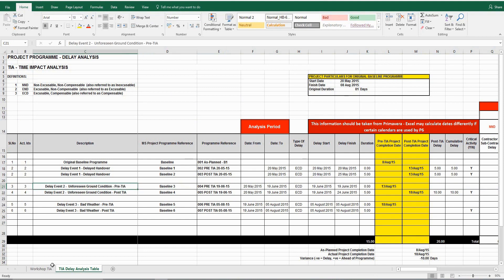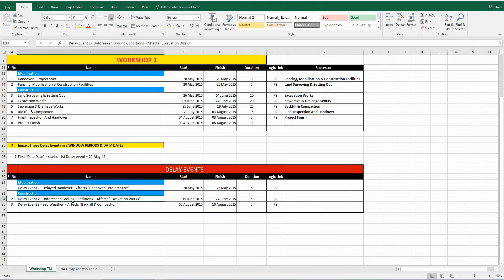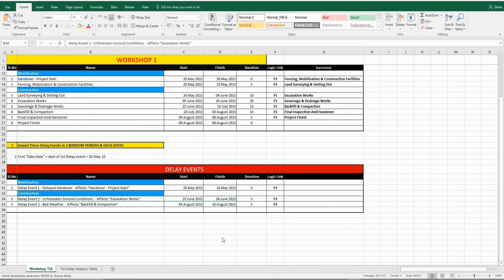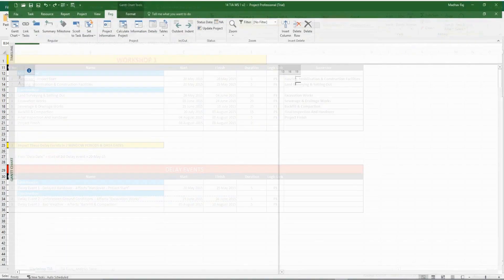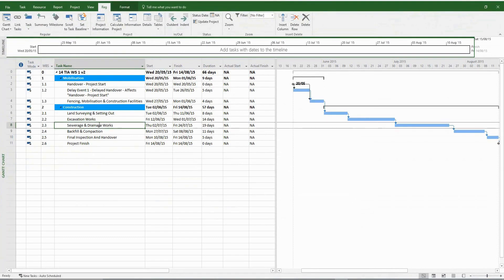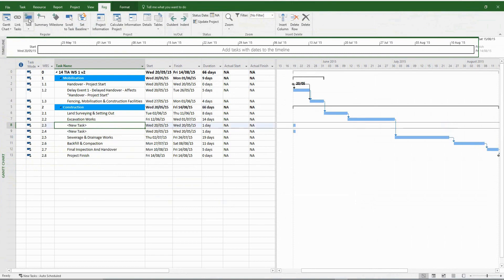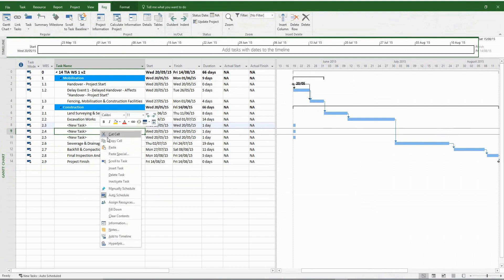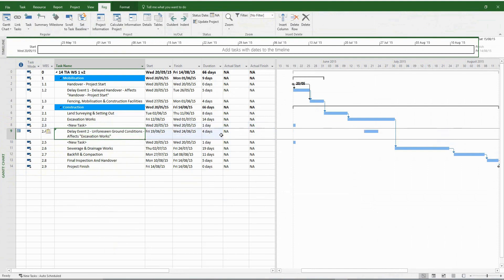We're going to repeat the entire procedure. Please copy and paste delay event number two from the Excel file and insert it into the MS Project program. An important thing to remember is that before you introduce the delay event, you need to update the program to see if there was any slippage to the planned program. If there was any slippage, you need to make a record of that and include it within the delay analysis table.